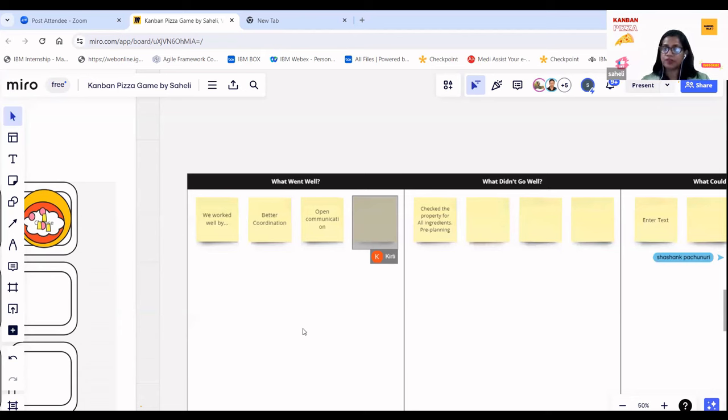So manage the process. I have seen in my experience, and I believe you have also seen, that in a team you have developers, and few people are also maintaining the testing work, right? If the testers are overloaded, we have seen that developers pick up another work but don't help the tester, right? So what we are doing here is not prioritizing, not focusing on the process. Instead of taking another work which is maybe priority 2, you should help the testing work if the priority 1 work is in progress, right?